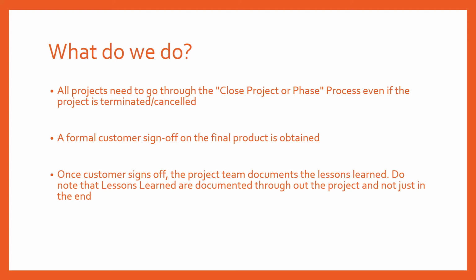So it's not like your project team, let's say, faced an issue, and then resolved that issue, and you feel like this is something that needs to go into the lessons learned, and you wait till the close project process to document it. That's not how it works. You maintain the documentation of lessons learned throughout the project. So this process is when you finalize it, when you add any additional lessons learned that the project team or the project manager might have, and you complete the documentation of lessons learned.